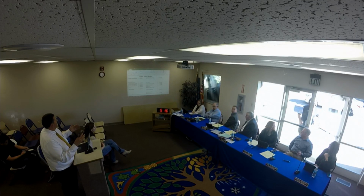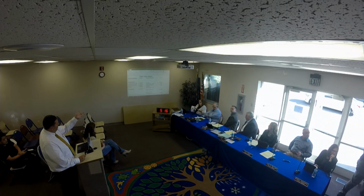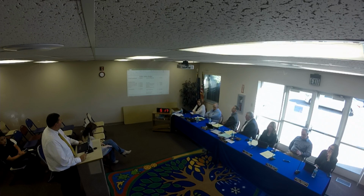Our costs are more or less locked in. Again, because we have a $590,000 contingency as a city, we're hoping that's going to take care of what we need to do. Potentially, if it becomes available, then it could again go towards our funding gap. We're not counting on that now because we just barely started building the building and we don't know where our contingencies are going to lie.